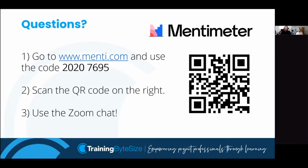Precisely, and that's why we should be estimating throughout the project, because it gets more accurate. It doesn't have to be that we do analogous at the start and then don't use it again. We can use analogous later on, because we might find information that shows the project we first used isn't as reliable as a new project we found. And if we follow that estimating funnel, since you brought it up, that should help refine our budget.